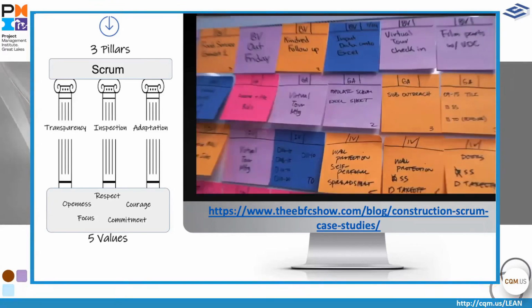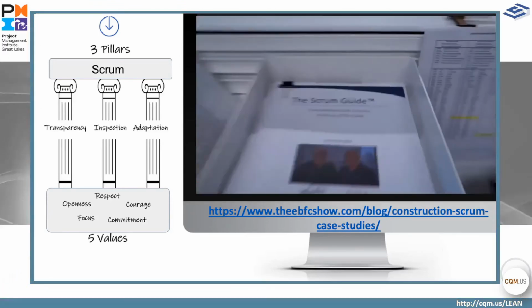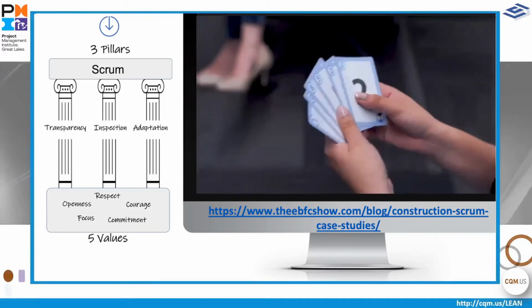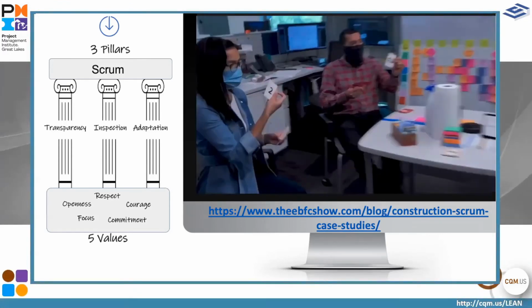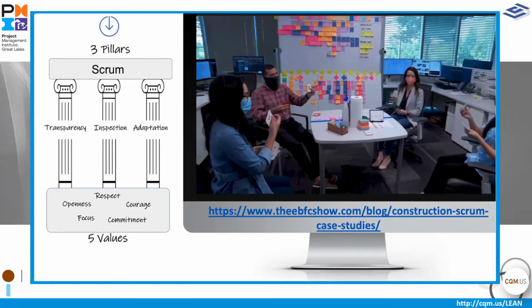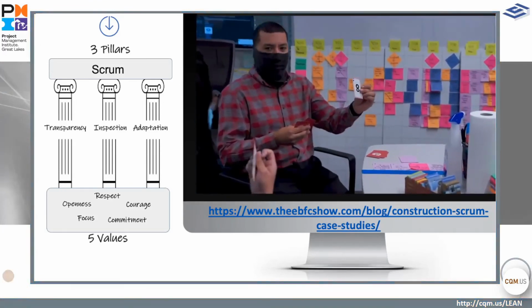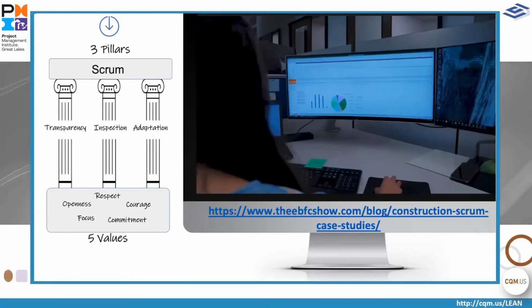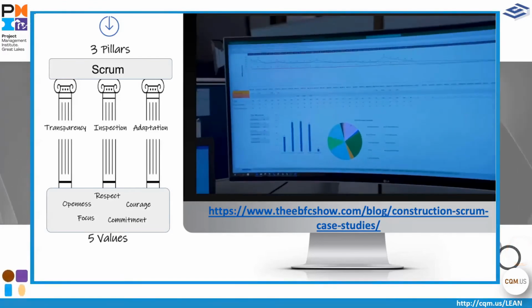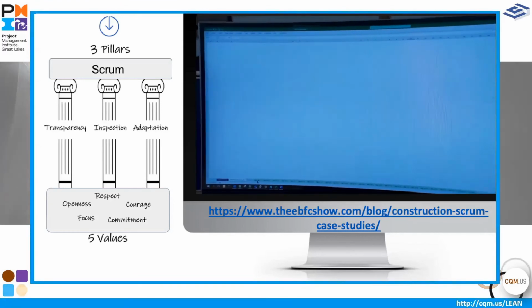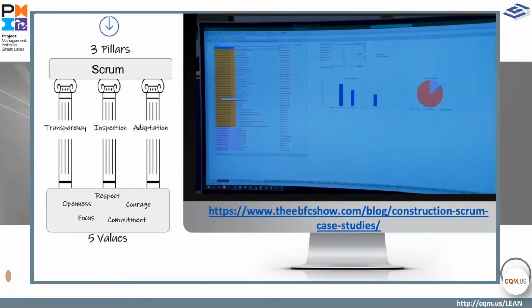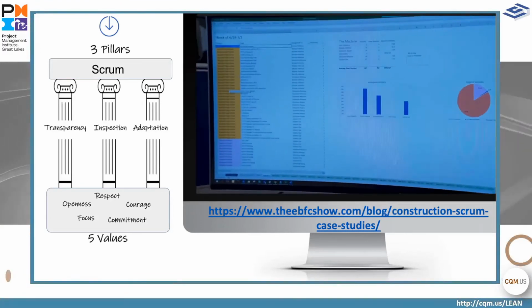Our tags have a velocity on the bottom right. In Scrum, velocity is measured in points per sprint, our sprint being 1 week intervals, and points based on human effort. So as a team, we talk about each task and decide collectively how many points each tag should have. We've collected data showing what our team can do. Knowing our capacity better allows us to plan for the future and create realistic milestone dates. Now our team knows what we can do and we have the data to show it.